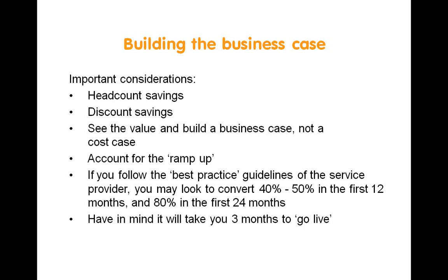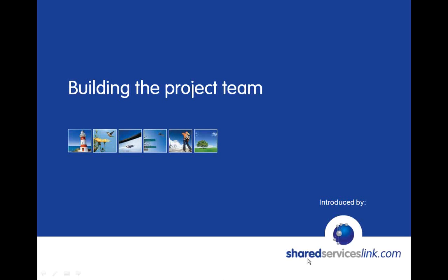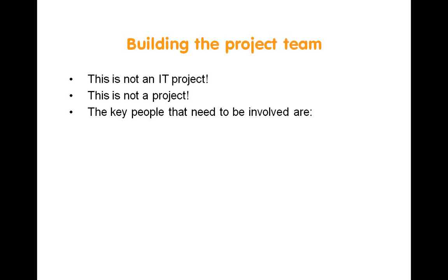What we normally see is perhaps 40 to 50% converted in the first 12 months, around 70 to 80 in the first 24 months. Do have in mind that from the moment you decide to go live with your e-invoicing project, you'll sign a contract, you'll have a kick-off. You probably won't see your first live transaction for 3 months. So again, count that in, factor that into your business case.